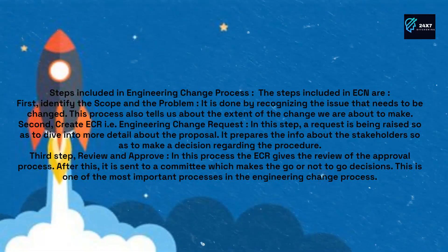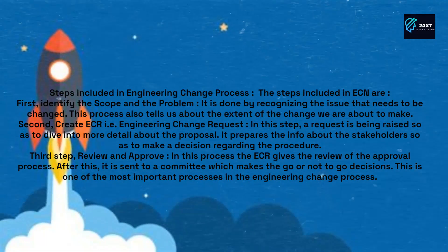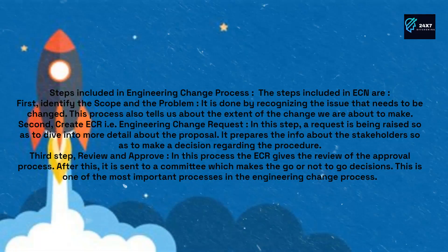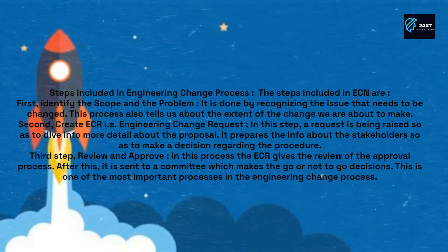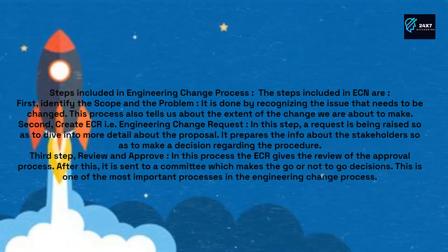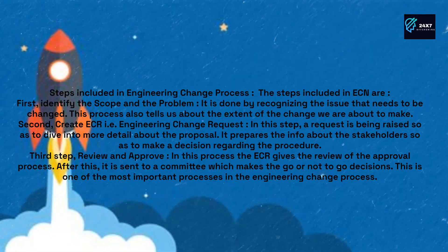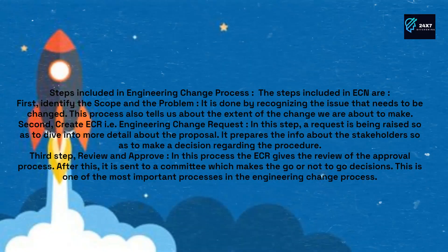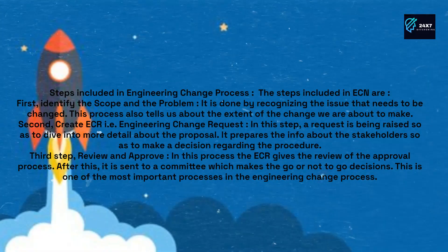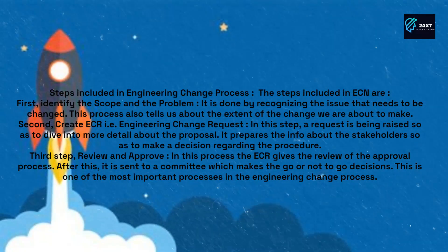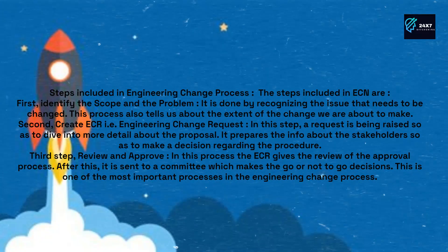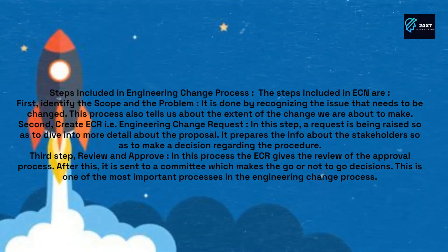The third step is to review and approve. In this process, the ECR gives the review of the approval process. After this, it is sent to a committee which makes the go or not-to-go decisions. This is one of the most important processes in the engineering change process.